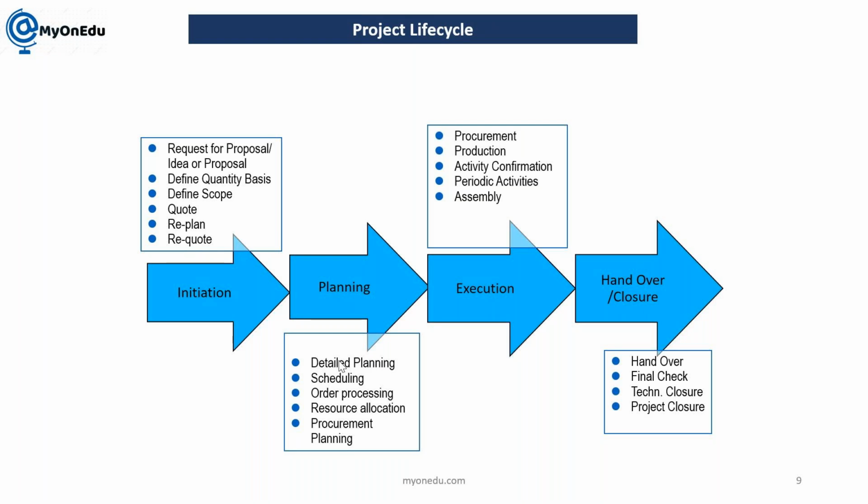Defect liability is nothing but a support period. Let's say it is an IT project, and when we do an implementation that is a 1 year project, it is 1 year plus 2 months. So 2 months is hypercare, a defect liability period where all the defects that existed until go live need to be rectified, as well as whatever we receive within the 2 months after go live. The project will be closed once all the snags or defects are rectified within the hypercare period also. Any question from this slide, please?